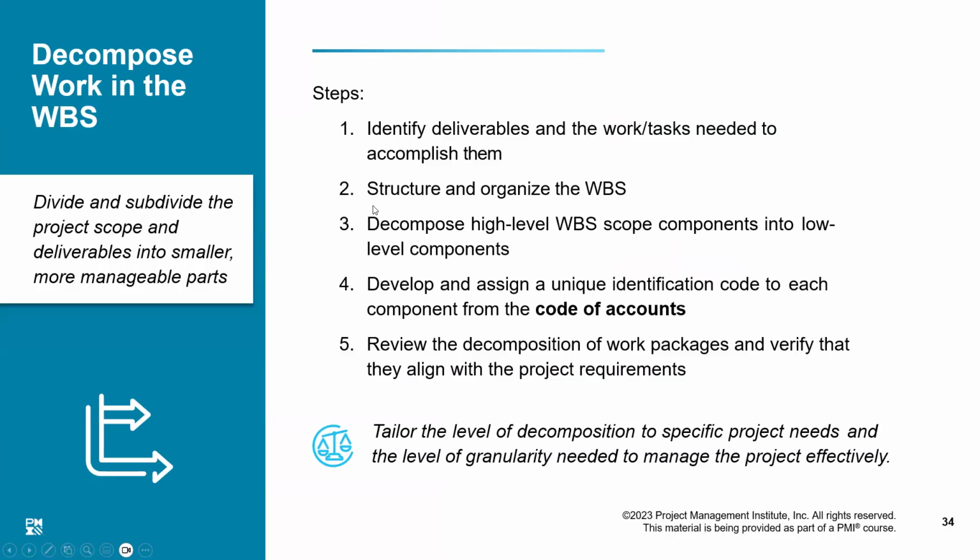Decomposing the work breakdown structure, as I have just described, you identify the deliverables and the work tasks needed to accomplish them, structure and organize the WBS as you have seen in the last diagram, and decompose high-level WBS scope components into low-level components. Like, you break down the project into control accounts, into work packages, and planning packages into further work packages.